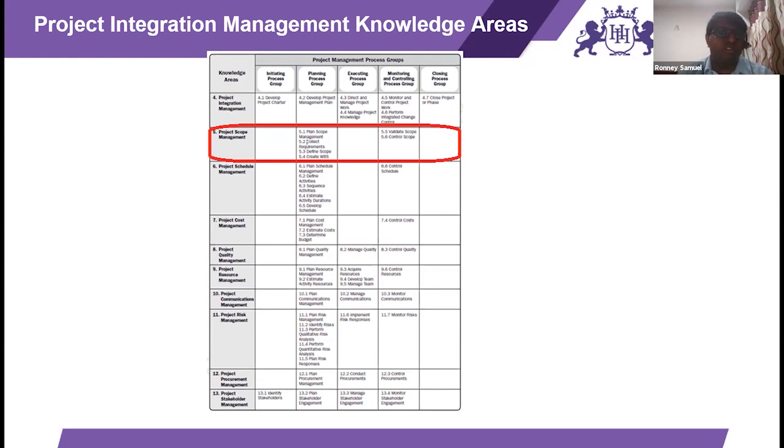Now this involves a discussion with the customer. Does that answer your question? Yes. The scope baseline is what we will have in the project management plan. If you remember, in the project management plan we talked about three baselines: scope baseline, schedule baseline, and cost baseline. Yes, understood.